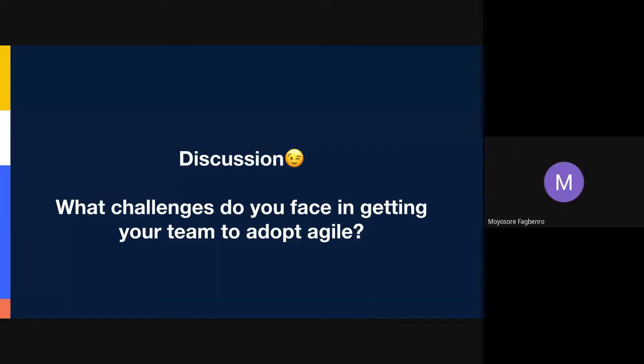Yeah, and just to contribute a little on that, it's also important to prioritize your bugs because not all bugs need to be treated immediately. So you also need to have a criteria for the kind of bugs that can interrupt your sprint. So for example, does it affect all users, so that users can't use your platform at all? Or is it a UX or a UI issue? If that's the case, then you might not need to. It's important, but if you don't do it right now, it's not affecting your users, it's not affecting their workflows. So it's also good for you to prioritize those bugs.